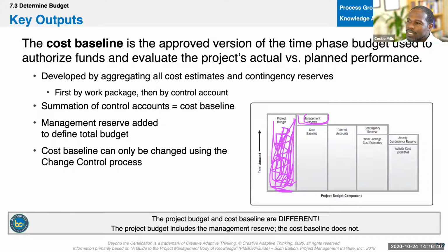I may estimate each activity out and say, okay, microphone costs so much, lighting costs so much, cameras cost so much. And then I use that for each of those activities. I come up with that number and now I have estimates for all of these deliverables. And then I say, well, but you know what? What happens if they install the system wrong? That might take a few more days, right? Because you have individual sound, lighting, video, but together they work as a system.